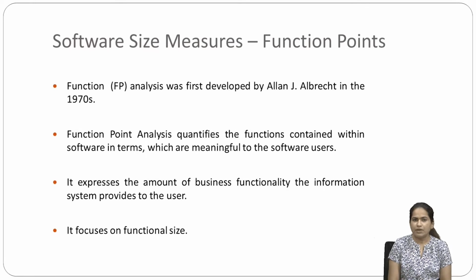After that, we have another software size measure which is called function point, FP. This was developed by Alan J. Albrecht in 1970s. Function point analysis quantifies the functions which are contained within software in terms which are meaningful to the software users.